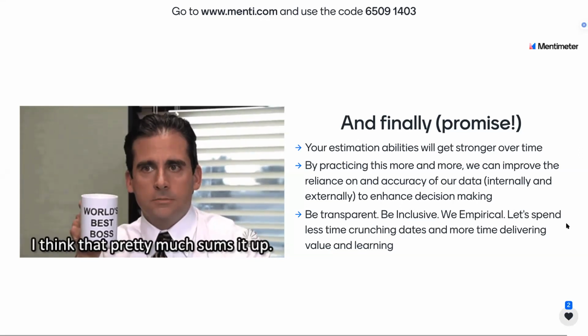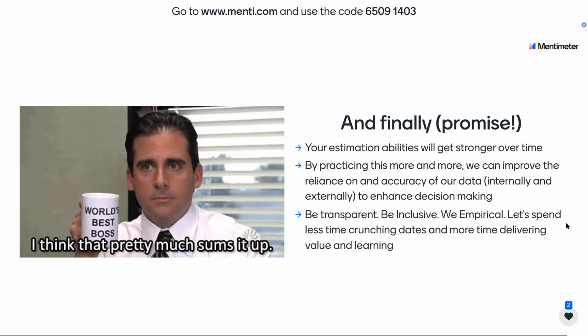And the more that we do it and the more reliable our data becomes through velocity, through our retrospectives and things like that, it can start to be relied upon by stakeholders, other senior leaders, and then we start talking in terms of sprints. It might take 3 sprints to get this one done, which equates to 6 weeks, plus or minus, you know, half a sprint. It can help prioritize whether we should do this epic over this epic. If we can look at this and go, yeah, we think it's going to take this long.